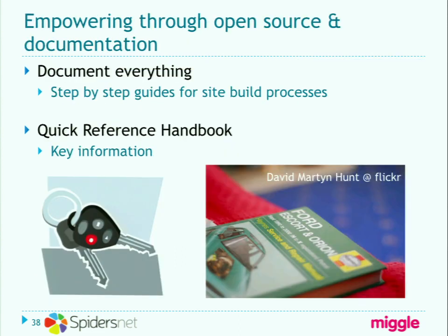And finally, we looked to empower them through the open source community and by providing documentation for everything we did. We documented any custom steps that we created that weren't covered by Drupal.org documentation. And we created a quick reference handbook, which contained all those key functions and Drush commands that they would need to interact with that platform on a daily basis. And that was the way that we empowered them and handed things over.